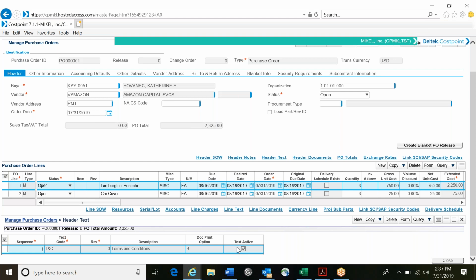So you have T&C for material, T&C for services, T&C for whoever, and based on all of that, we can pull them up separately or default them in. Okay. You can also, and I'll be happy to show you how we do that, default it based on the project number you select. So if you select a particular project number, it will default certain text on the POs.